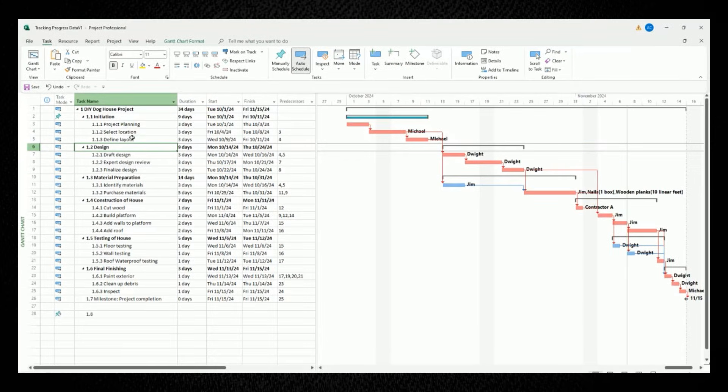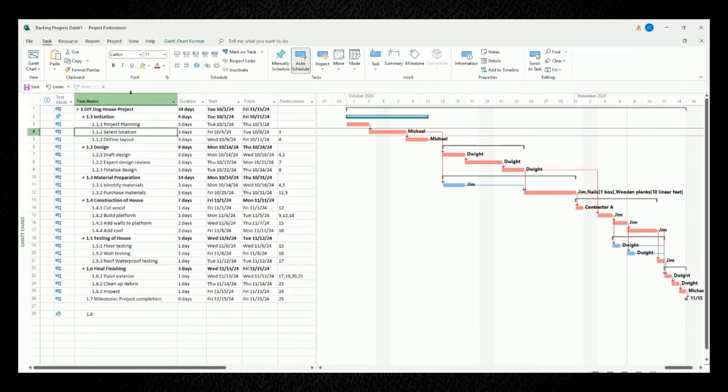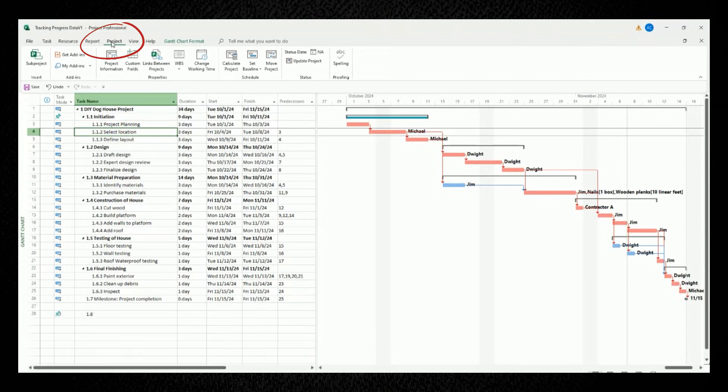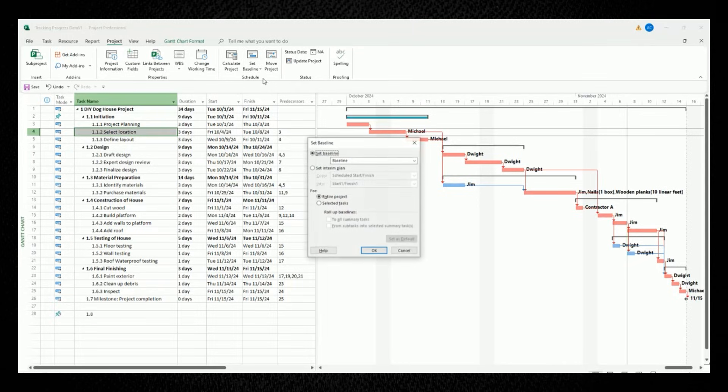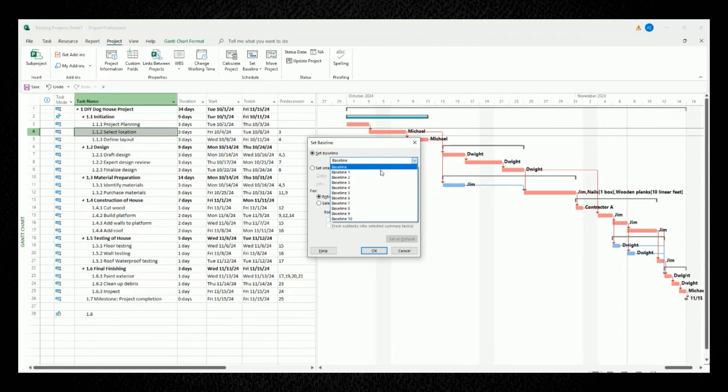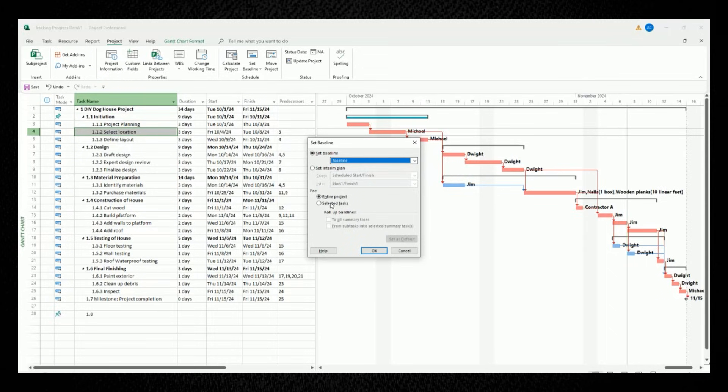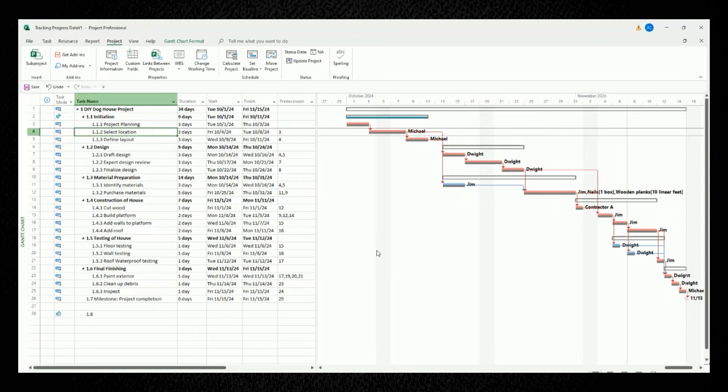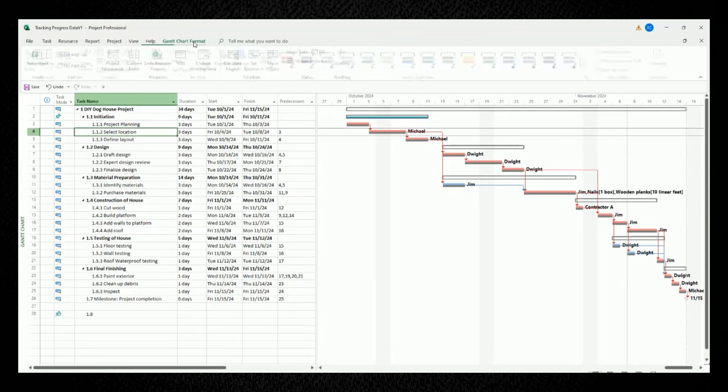To do this, move your mouse to the project tab that's showing at the top portion of your screen. Left click it, and click on the set baseline button in the schedule panel. Then click on set baseline. You'll see this pop-up window appear. Now for the first drop-down, let's choose the default baseline, and underneath it, we'll set the baseline for our entire project. After you click OK, you'll have created your baseline for your entire project.